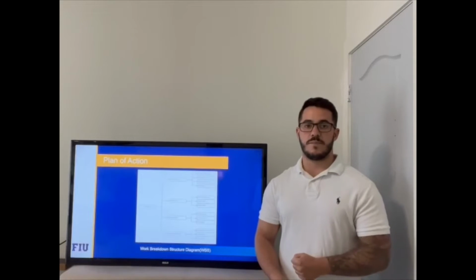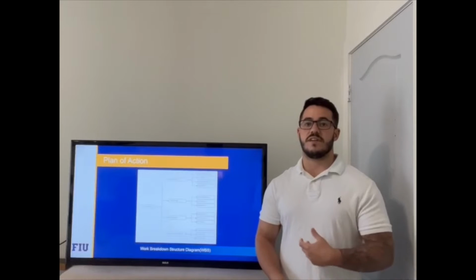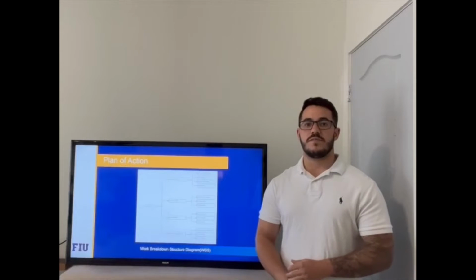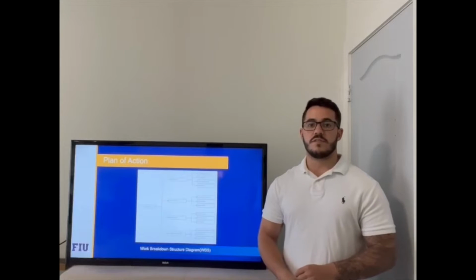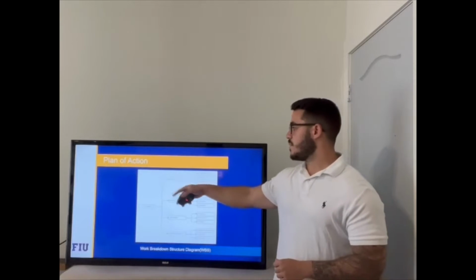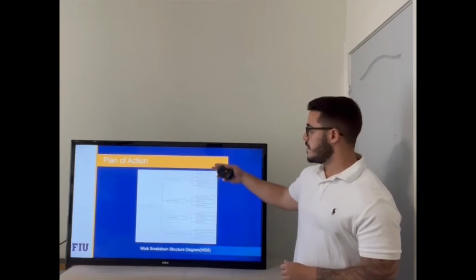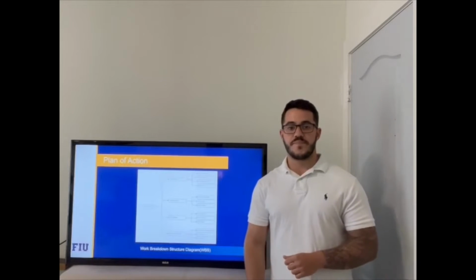Gantt and PERT charts. The work breakdown structure is a valuable tool when seeing the project as an outside source. It allows the team to visualize the project separated by phases and tasks. Our work breakdown structure shows the tasks that need to be completed in each phase to move on to the next. For example, here we have in phase 1, project research. We must complete these 4 tasks in order to move on to phase 2, hardware design.